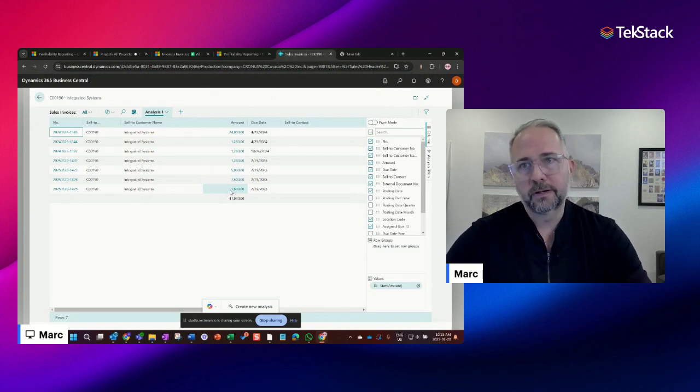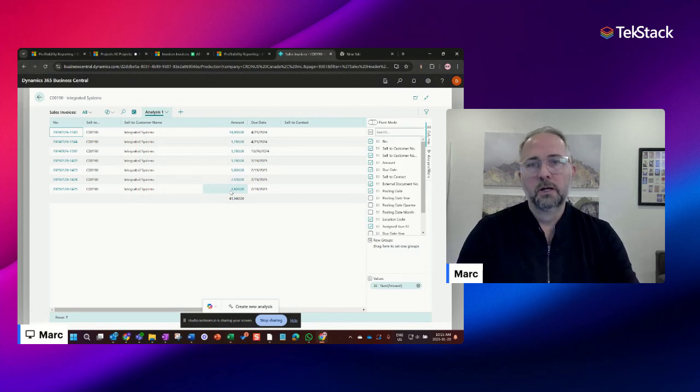Kind of the benefits of this kind of process. Number one, you really shorten your invoicing window. If you're doing time entry on a weekly basis, which is recommended, if not daily, recommended to do at least weekly, you're going to get that billing cycle shortened really nicely for a month end. So if the month ends on the 31st, you ideally want to get invoices out on the 1st. So if you're doing weekly time entry, that makes that process a lot easier.